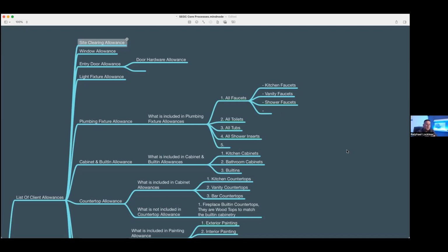You have to always have a buffer above that number to help cover in advance some of the surprises. Where people get into a lot of trouble with building custom homes is the surprises, and building at the very top of their budget with no contingencies, no reserves, thinking that maybe they could go back to the bank, when oftentimes you're not able to go back to the bank and ask for more money.